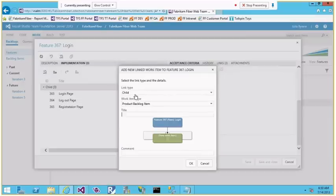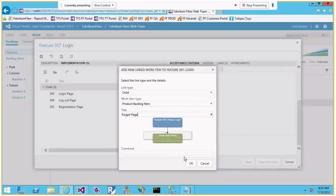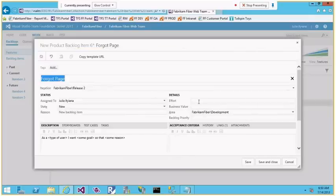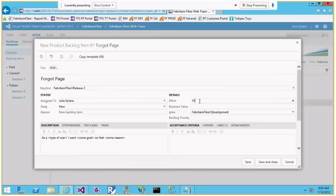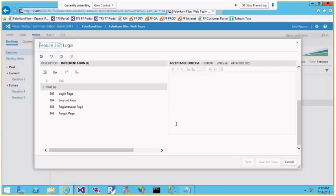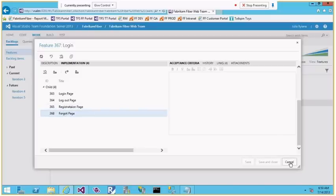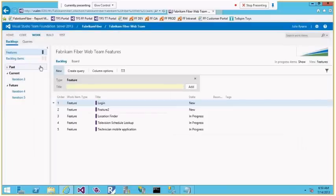From the feature I can also create a new product backlog item — for example, a forgot password page. I can click OK and add an estimation; story points are a relative number. Let me set it to seven and close. You can see it is now listed there, showing the hierarchy from feature down to product backlog item.